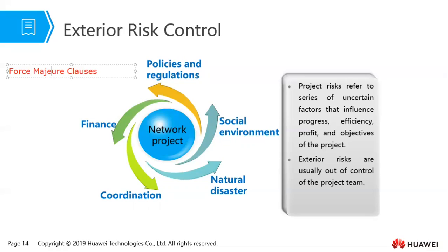Unforeseeable circumstances that prevent someone from fulfilling a contract. So please, always make sure that some of these risks are actually captured in your project contract under a force majeure clause.